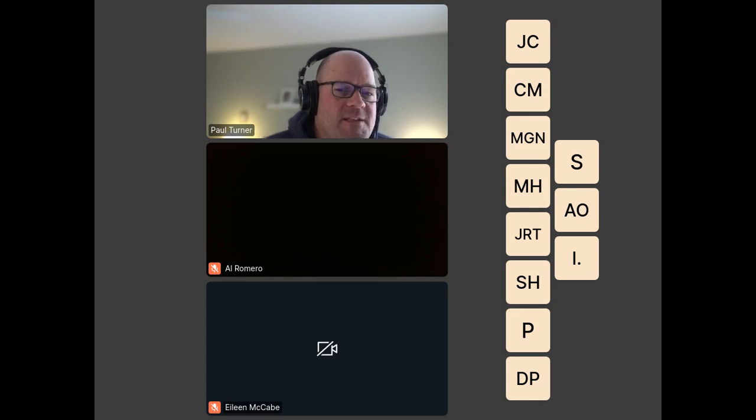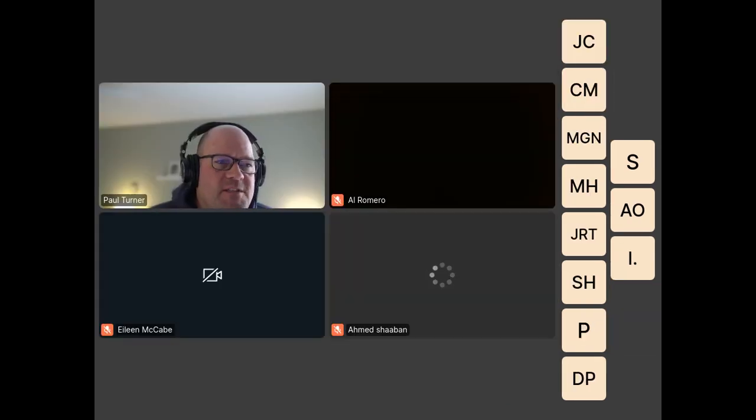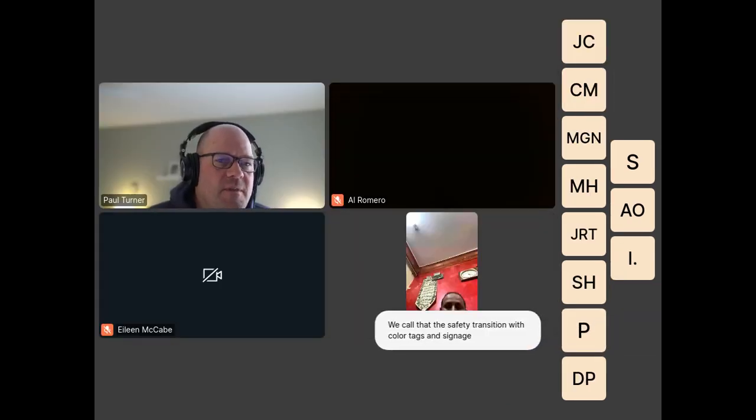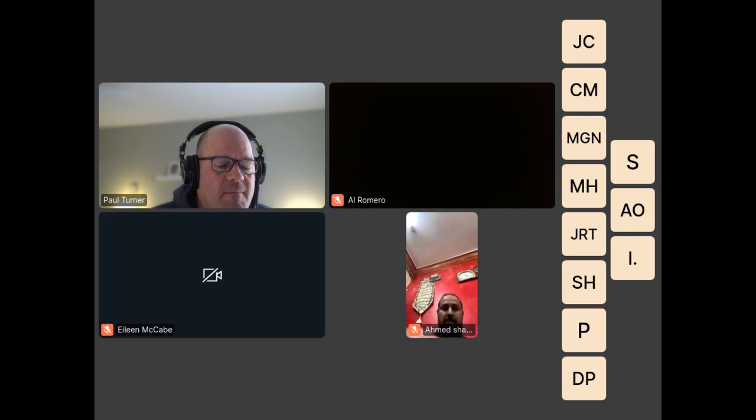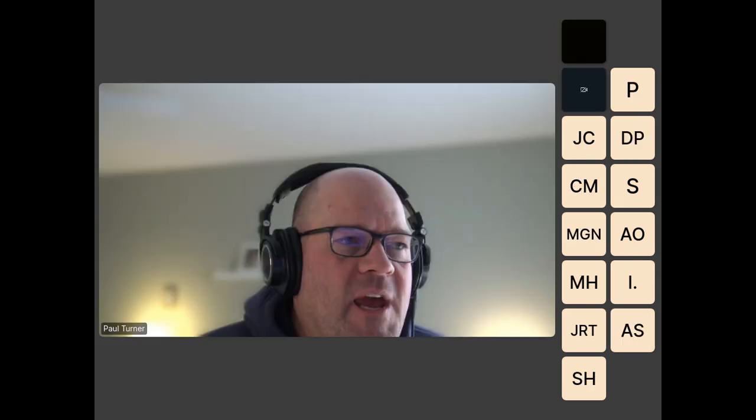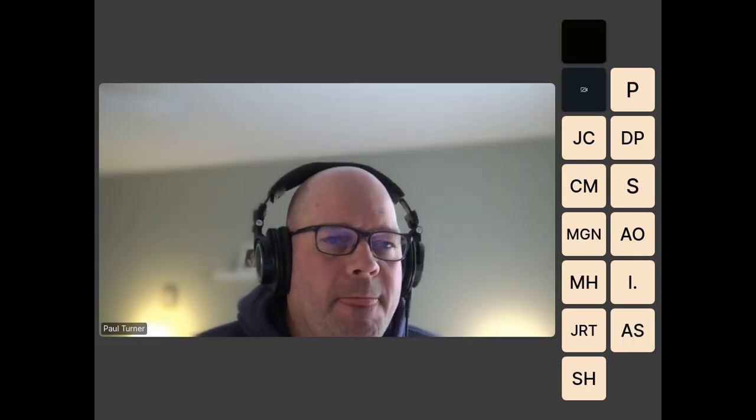What that means then is that if construction groups need to get back into that area, which they certainly will to be able to address type B and type C deficiencies, then they need to be requesting access to those areas to make sure that it's safe to enter now that commissioning is performing activities in that area. It has to be a controlled, structured process like that. We can't have multiple groups working in the same area.